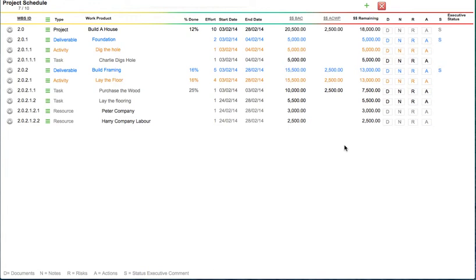If you find out that the 25% is inaccurate, that it really represents a smaller percentage, 20% for instance, then what you want to do is go back in and change the budget at completion, which is currently $10,000, and increase that amount. So it's $12,000, let's say, to give you approximately your 20%.